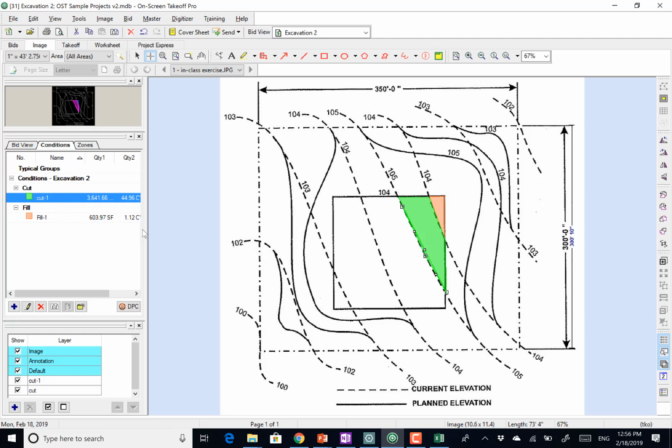What I want you guys to do is the grid section, the spread footings and continuous footing excavation, right? Backfill if you need to do, correct? We talked about backfill last time, right? So the cross section, backfill, spread footings and continuous footings, and then you'll have to tell me how much material must be hauled away or must be borrowed, because that has to be priced in as well. So four items, right? Keep in mind that backfill will actually be backfill plus compaction. So when you go to RS Means, you need to give me total amount of cut, total amount of fill, compaction, and hauling. These four must be priced.